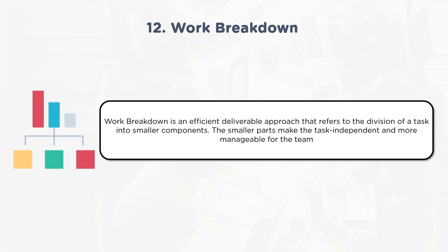Further, after creating a work breakdown structure, one will sequence the activities. Sequencing will happen based on the priority and order in which deliverables should happen. Once the sequencing is done, it will be checked to see whether anything can be optimized, so that a smooth flow of the project can happen, with no dependencies that will make the project delay. You would find various techniques like critical path method, network diagramming, and critical chain method. All these are used.